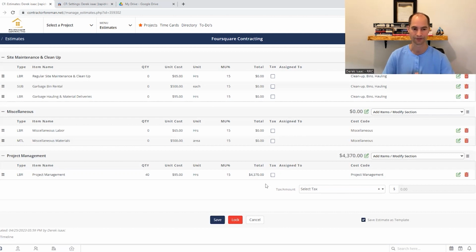The reason for this too is you can code your hours, so you can go back later and see, oh, it actually took me 60 hours to manage this project, I should be budgeting more for project management. Or maybe it's, hey, I only took 30 hours, but a similar project by my project manager took 60. So what's going on? How come they aren't as efficient as me? Or how can we coach them to be better at project management?